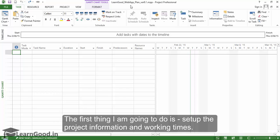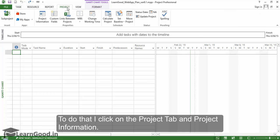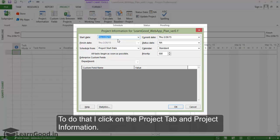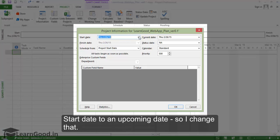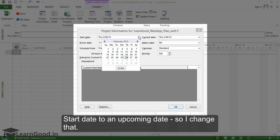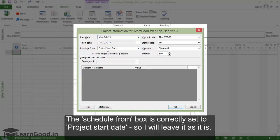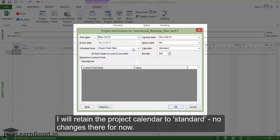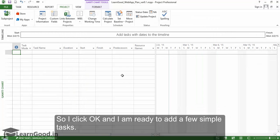The first thing I'm going to do is set up the project information and working times. I click on the Project tab, then Project Information, and a dialog box opens up. I change the start date to an upcoming date. The Schedule From box is correctly set to Project Start Date, so I'll leave it as is. I'll retain the project calendar as Standard. I click OK, and I'm ready to add a few simple tasks.